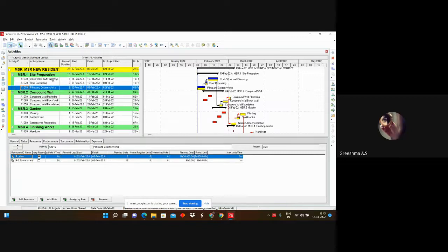See, now we are concentrating on an auditorium project, right? That auditorium project will be handled by 4 or 5 members, and those are the people we consider for the auditorium. That doesn't mean they will be responsible for the whole project that comes under a particular company. The OBS positions are not changing. OBS is constant. Understood, ma'am. Yes, for the whole company you do OBS, and for a particular project you do just roles. Yes, that's the idea.